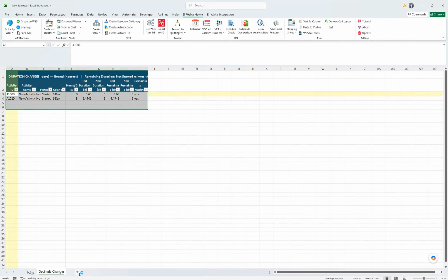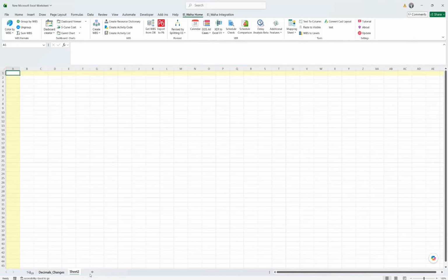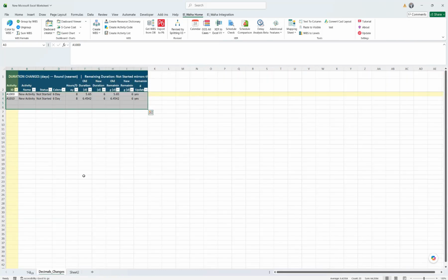Also, if you still have problems with the calendar or other issues, which this won't solve, it will create a sheet below. So, always check the sheets that appear, as they will tell you the problems present in the table, which you will have to fix manually, and you might also need to run the tool again. I mean, problems like what? For example, you have a day where you made an exception, like your calendar is set to 10 hours, but you made one day 9 hours. This will cause problems in the schedule. You must standardize your calendar and make it 10 hours.